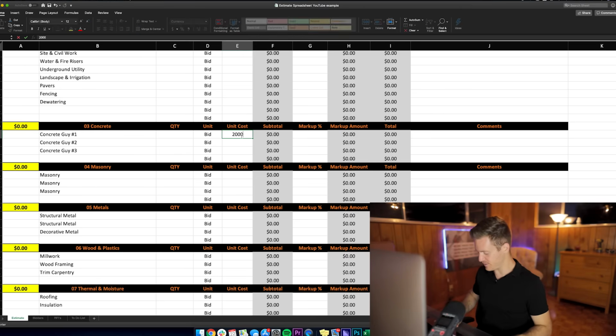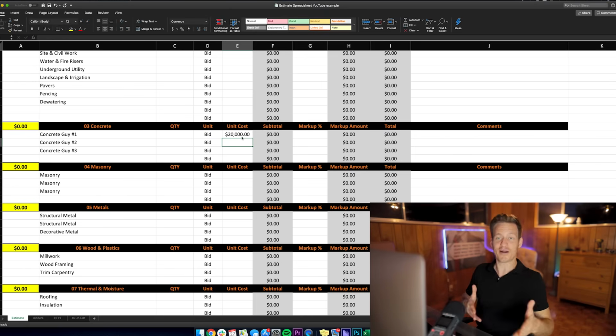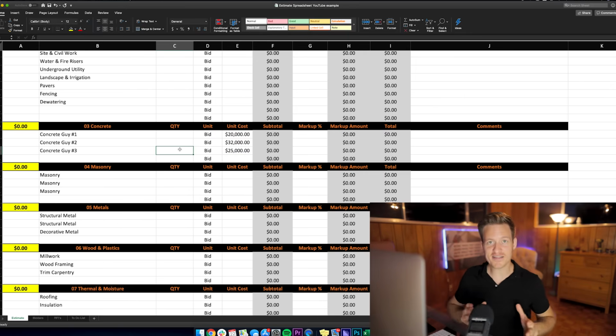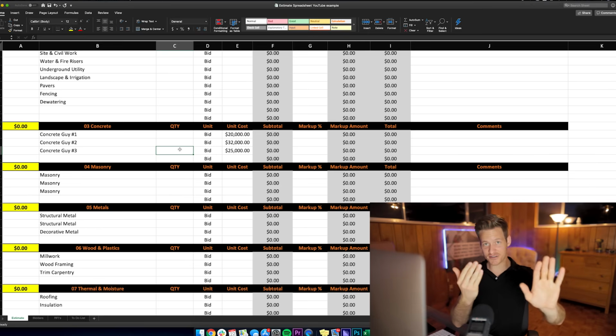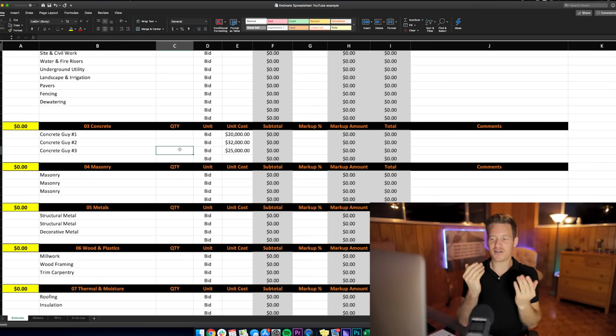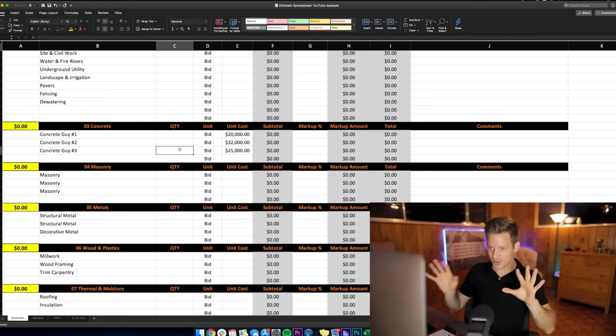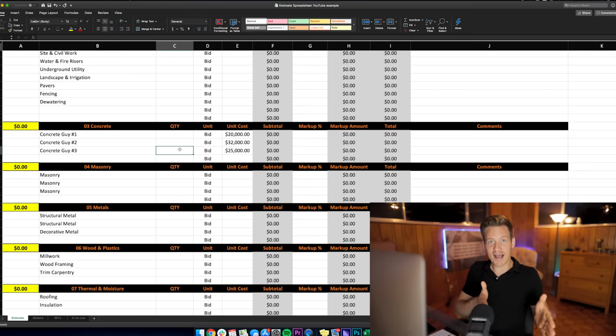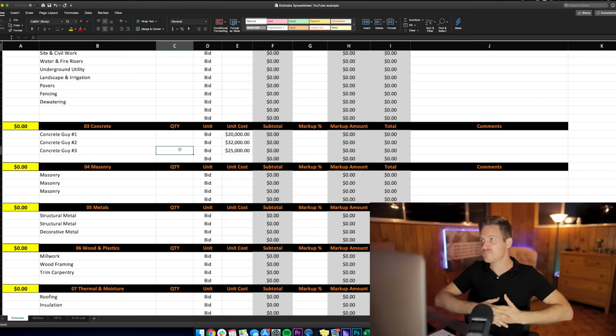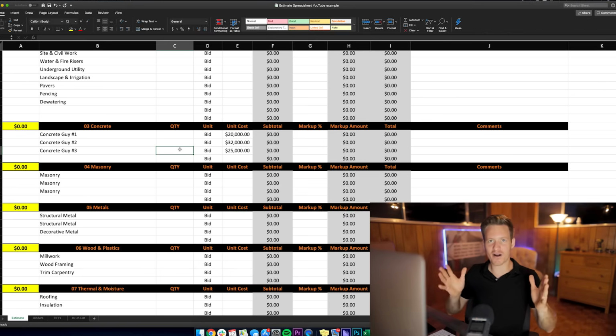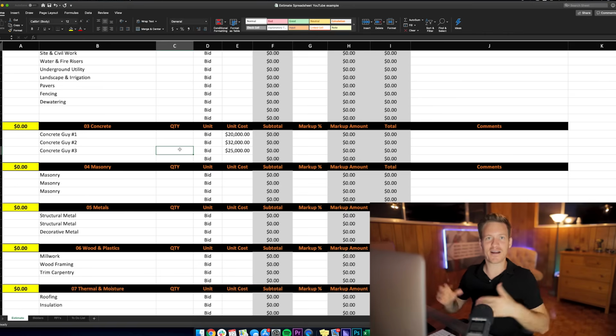Let's just say it's $20,000, right? One guy comes in at 20 grand, one guy comes in at 32,000, and one guy comes in at 25,000. So this is bidding as a general contractor. You're looking at the exclusions, saying what's included and what's not included in this bid, and you're comparing that between this guy and this guy to see who's got what, and maybe the one guy caught the extra number 5 rebar that needed to go in for the stairs or whatever it may be.